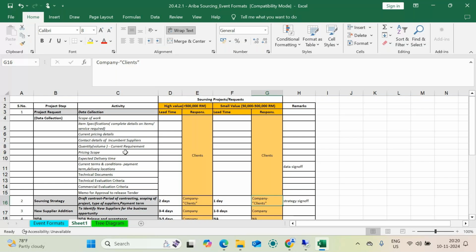But for what materials can we do it? If you have to buy services like cab services, telephone services, Wi-Fi services, you have multiple suppliers and providers for that. You have raw materials, laptops, electronics, so for those you have multiple suppliers in the market. But you have to decide the value for that auction. If you are buying that material one time and the amount is less than 50,000 rupees, are you going to waste your time for that 50,000 rupees?